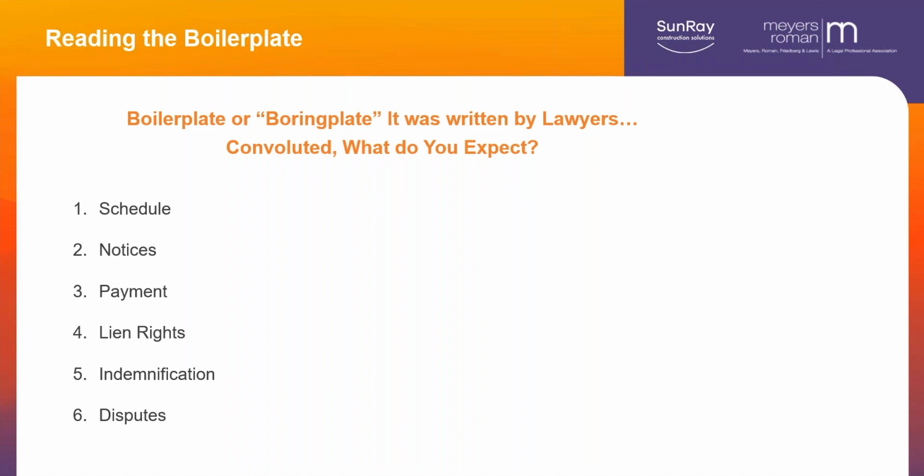All disputes will be resolved by arbitration in accordance with the rules of the American Arbitration Association construction law rules. That's fine, except for the first part that says at the exclusive choice of whoever's above you. No, no, no. It's one or the other. Because if it's the exclusive choice of somebody else, you can say, okay, I have to file this arbitration. I've got one right now. There's an $800,000 dispute. The contract calls for arbitration.